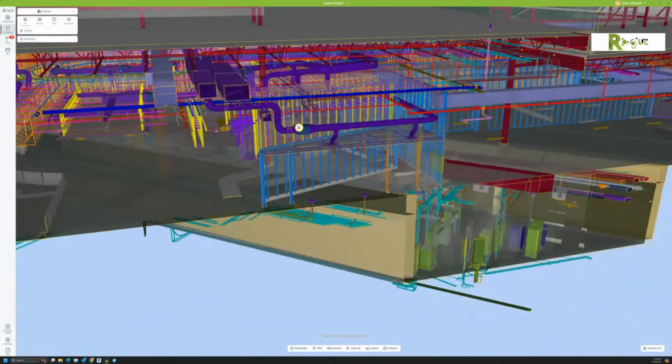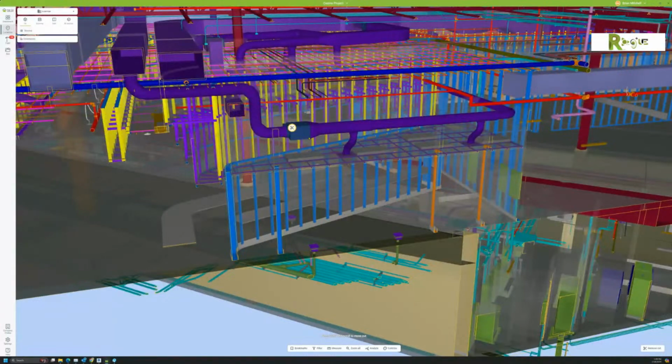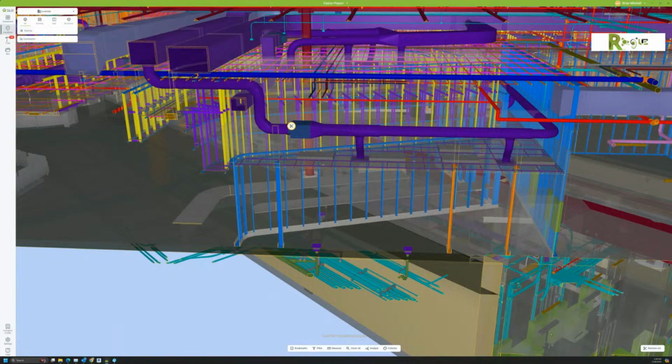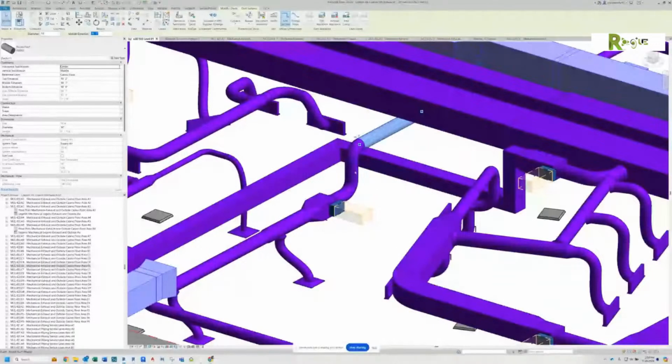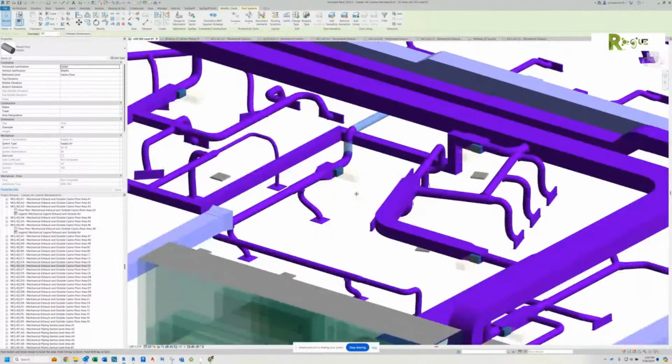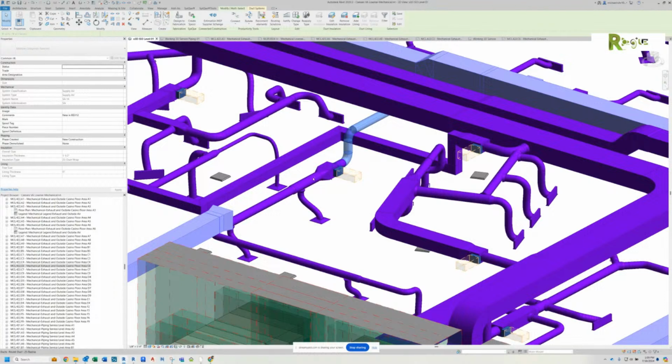See, it drops down, comes over here. This is the square VAV duct. Huh? I'm looking at the stuff behind it. Yes, this is what I remember. Okay, wonderful. So let's see what we did. We moved this piece right here, right? And that piece. All of that is new. We need to get that fabricated. It's all new? It's all new. Nobody even knows about that yet.